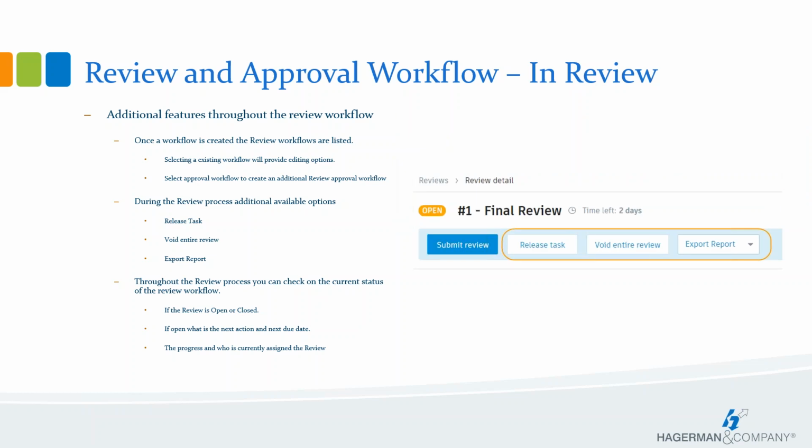The reviewer buttons have also been changed to improve the review workflow so that the action options are more clear. So of course we have the submit for review. Once someone's done reviewing a file, they can submit that for review. But there's also a couple of other options now. One is release task. This will cancel the reviewer's assignment and it will be available for someone else to start the review for that workflow step.